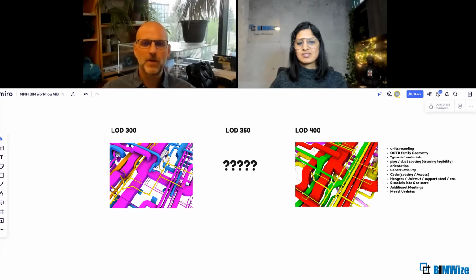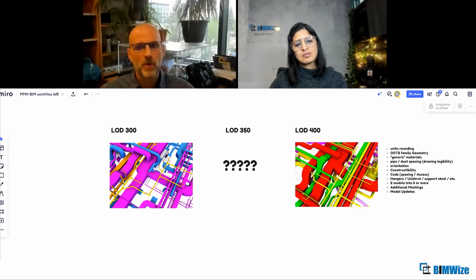So based on that, the assumption is that whatever we define before that handoff is going to have some sort of utility. But what we're finding, especially in MEP, is there's just absolute rework there. It's basically starting over, and all the coordination and all the effort and all the development that went into it before that handoff gets thrown out, and then we start over from scratch.